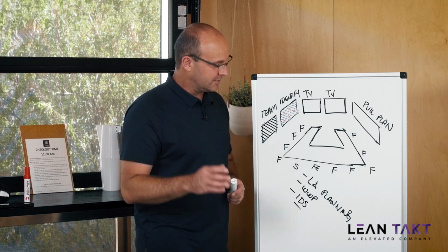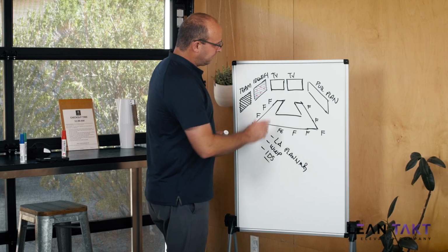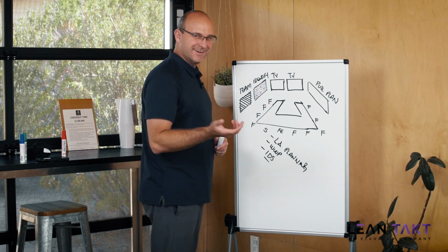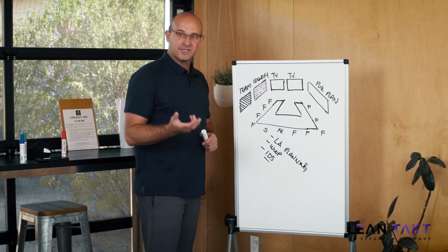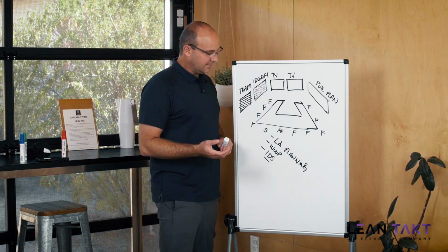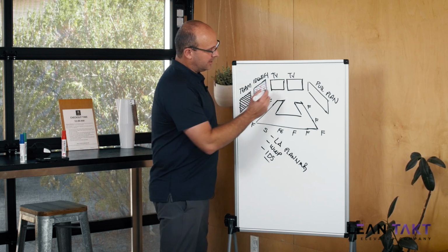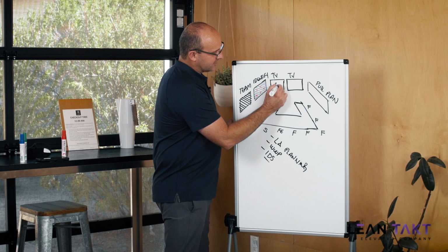So let me talk about how this flows. Before the meeting, the trade partners come in, they identify on your identify boards any constraints or roadblocks. Then you, as a part of the meeting, will come up here and pull up your norm level takt plan.